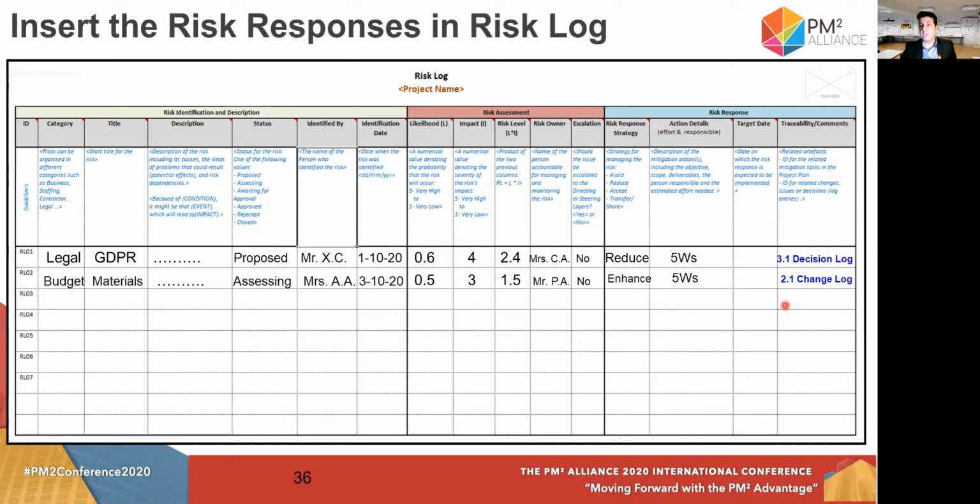Also, do not forget to connect, in this last column, the risk log with a decision in the decision log, like decision 3.1, or with some changes that you might implement because of that response.